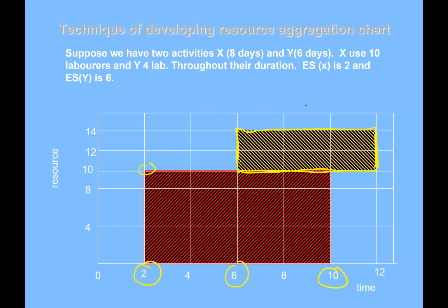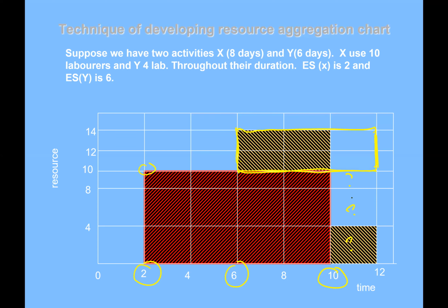But you notice there is empty space here. By right, when we draw the diagram, it should fill up, because the diagram is a 3-in-1: it indicates the timing, the quantity of laborers, and the activities. So it should be drawn properly. The final drawing should look like this. You notice there is a split in the green block here.